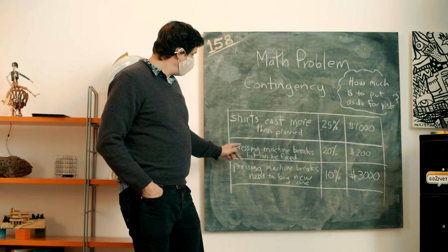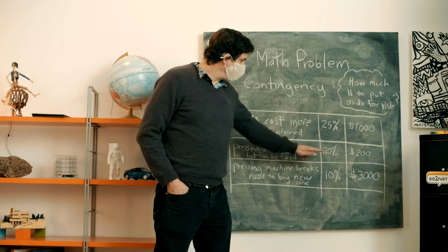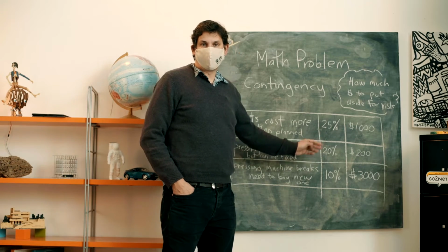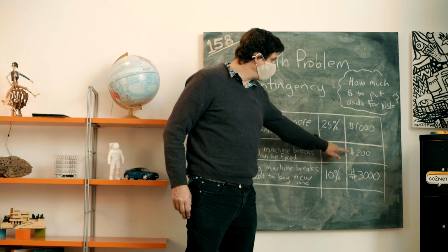The next thing is the pressing machine. What if it breaks, but we can still fix it? We think there's about a 20% chance that it can break. That's just what we heard from friends that have done t-shirt pressing. And it would cost about $200 to call someone out to fix it.